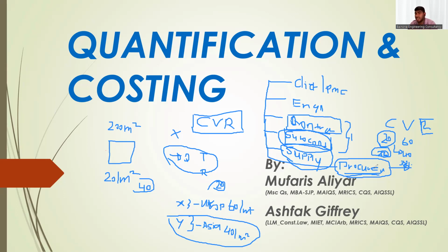Then when the project is at the end, once the taking over certificate is issued, don't get confused with all these terms, you will get to know them. I'm just telling you that it's a kind of closing out of documents you have to handle. For example, the statement at completion, releasing retention, and full advance payment recovery. Then you have to ask for confirmation from the client, then submit to the bank to get your premium. There are so many duties of quantity surveyors working under contractors and subcontractors.